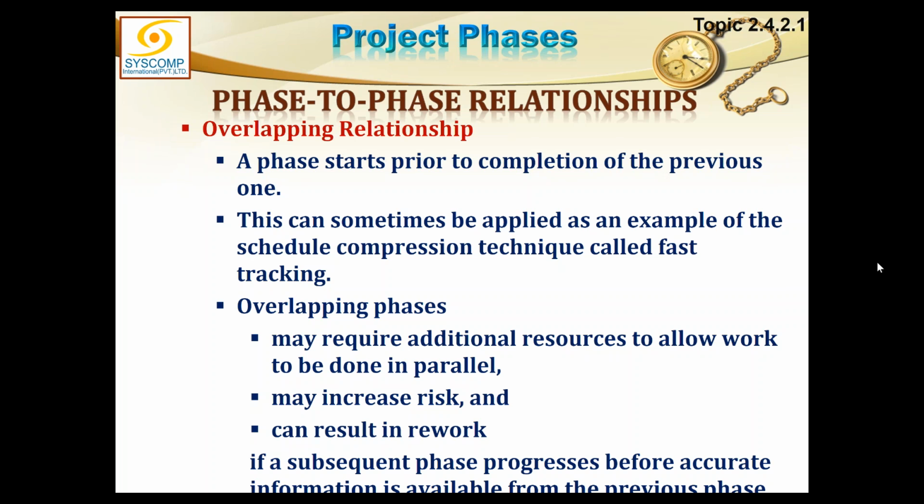And as I said, it will increase your risk and it may result in rework. It may result in rework even of the good work you have done, that also may have to be demolished and redone, if a subsequent phase progresses before accurate information is available from the previous phase. A lot of input goes into the next phase from the previous phase, and the previous phase is not yet complete. Lessons learned are not there. The inputs are not there. How have you started working on the next phase? You have taken a lot of risk here.